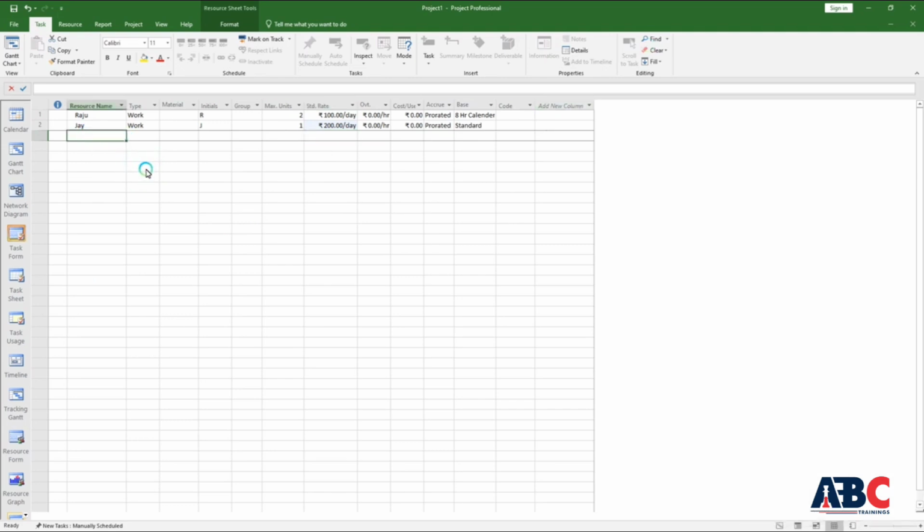If you want to add material or other resources, you can add them. For example, I am adding a material. I have added cement. We will have to set the cement unit in material. So for this, I will put 1 unit here, but the cost will not come per day, or the details will come separately because it is according to the material.